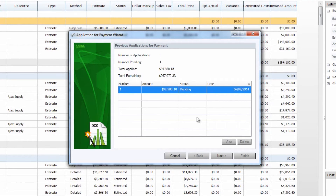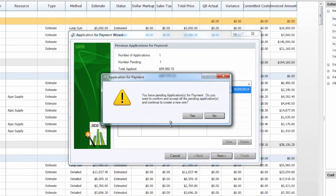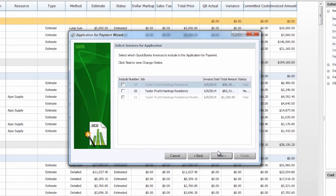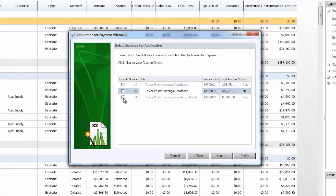It'll give us our balance to finish, and as soon as we review this and click next it will ask if we want to accept that previously pending application for payment. In this case they must be confirmed in order to generate a second one, so we will select yes. You'll see that this is now listed as application number two. All of our other information is going to remain the same, so we will continue. When you get back to the invoices you will see that the two previous invoices we included are still present but they are grayed out so you cannot include them. This ensures that you will not invoice for an item twice, so in this case we just have this one invoice left to include.